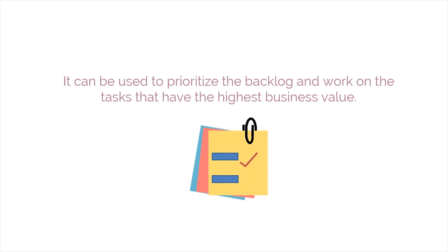Another important technique is value-based analysis. It can be used to prioritize the backlog and work on the tasks that have the highest business value. An item's business value is calculated based on the relationship between its development cost and business benefit.